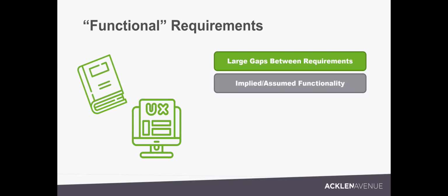A lot of times people, especially startups, come to us and they have all their mockups. They give me all their pixel perfect mockups of how everything should look, and they say, tell me how long that will take. And I'm like, that is not a great way to estimate something, because when you give me just the picture of what the final thing is, there's so much implied in there and in how things connect that I don't know, that it's really hard to get down to the nitty-gritty of that.